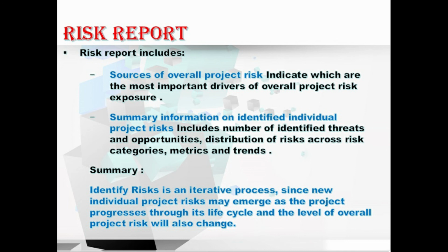First, with sources of overall project risk. In this, it indicates which are the most important drivers of overall project risk exposure. And the summary information on the identified individual project risks includes the number of identified threats and opportunities, distribution of the risks across the risk categories, metrics and their trends. Hope you understood about this output of identify risk.